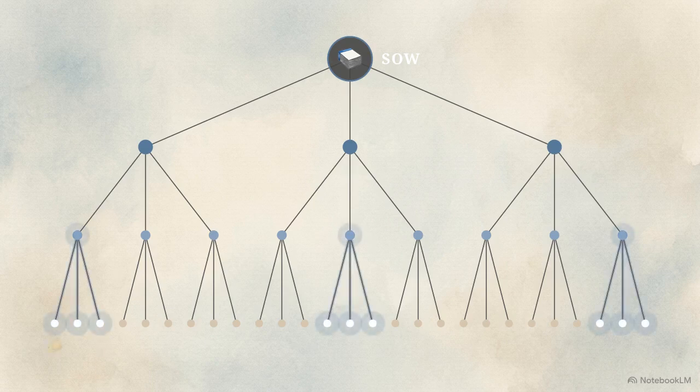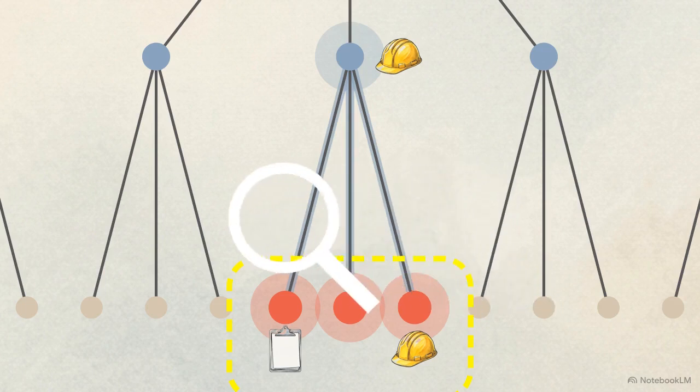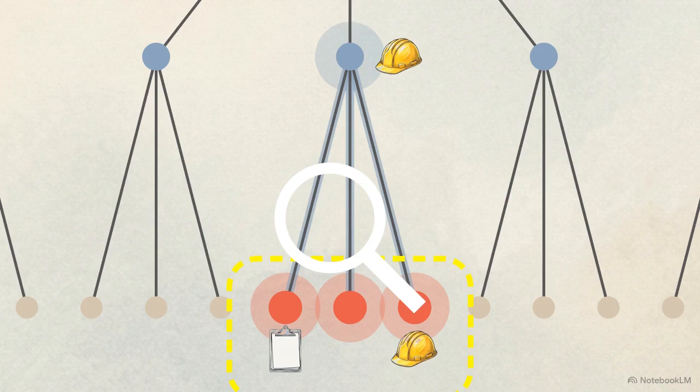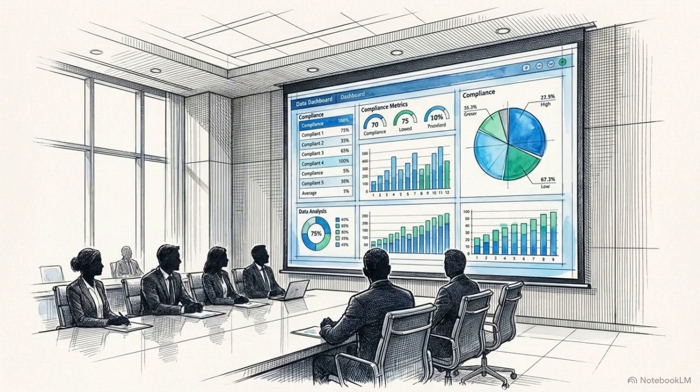By mapping inspection tasks to specific branches of the WBS, QA/QC teams can implement targeted resource allocation, ensuring that inspectors and equipment are scheduled exactly where and when they are needed. Within this structure, certain sub-activities carry a disproportionate impact on project safety and regulatory compliance. Identifying these critical nodes early allows the team to prioritize the most sensitive areas of the build. By focusing oversight on these specific high-risk sub-activities, projects can implement specialized mitigation plans, generate structured reports for stakeholders, and foster a culture of continuous improvement.